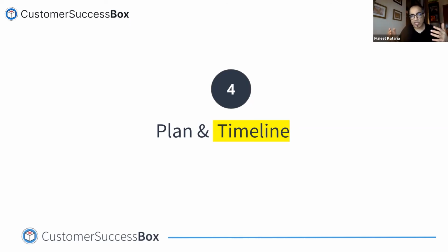What you don't want to see is the customers keep slipping on their commitments and we are still held responsible for the same go live date. And that establishment needs to be done. We can go live on 25th of August, provided we follow this plan. And if we miss any of those plans, make sure you call out not on 25th, but as you miss every timeline. That's going to be the beauty.